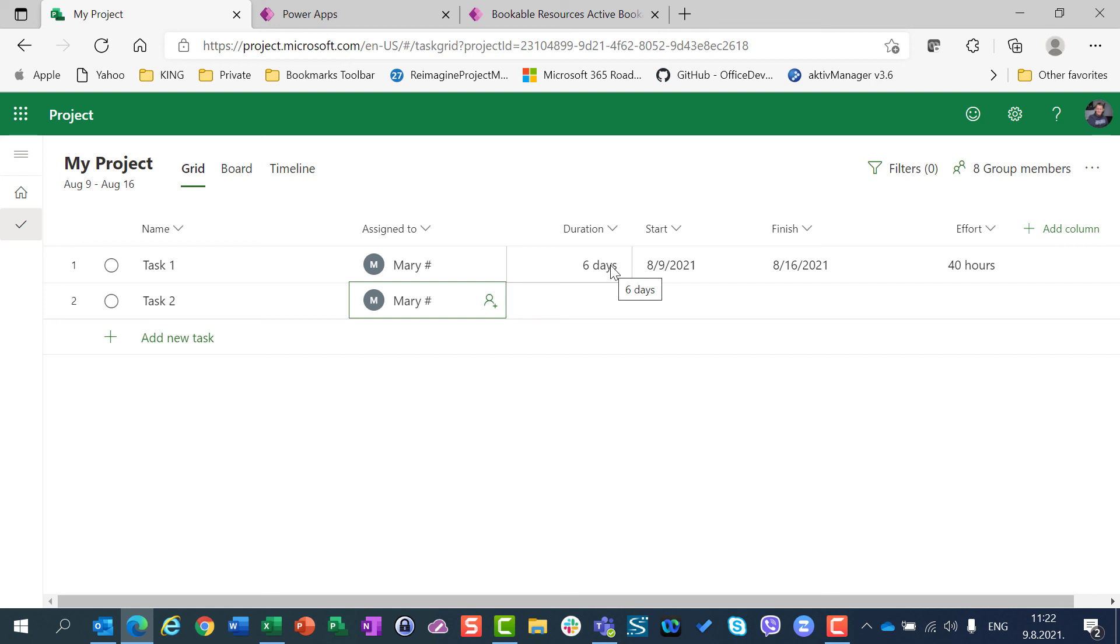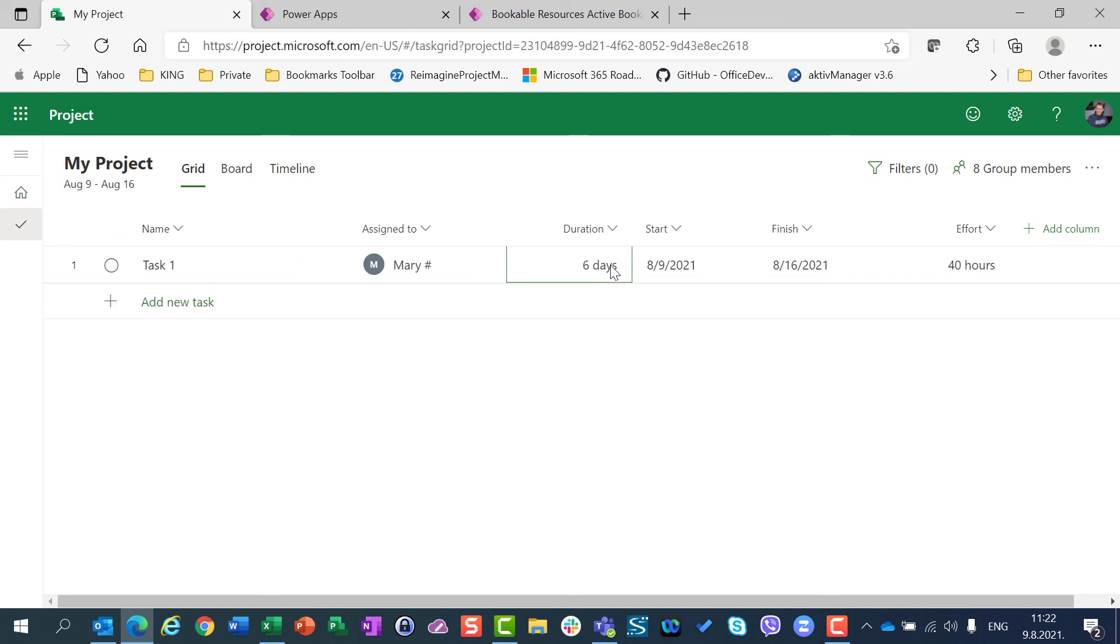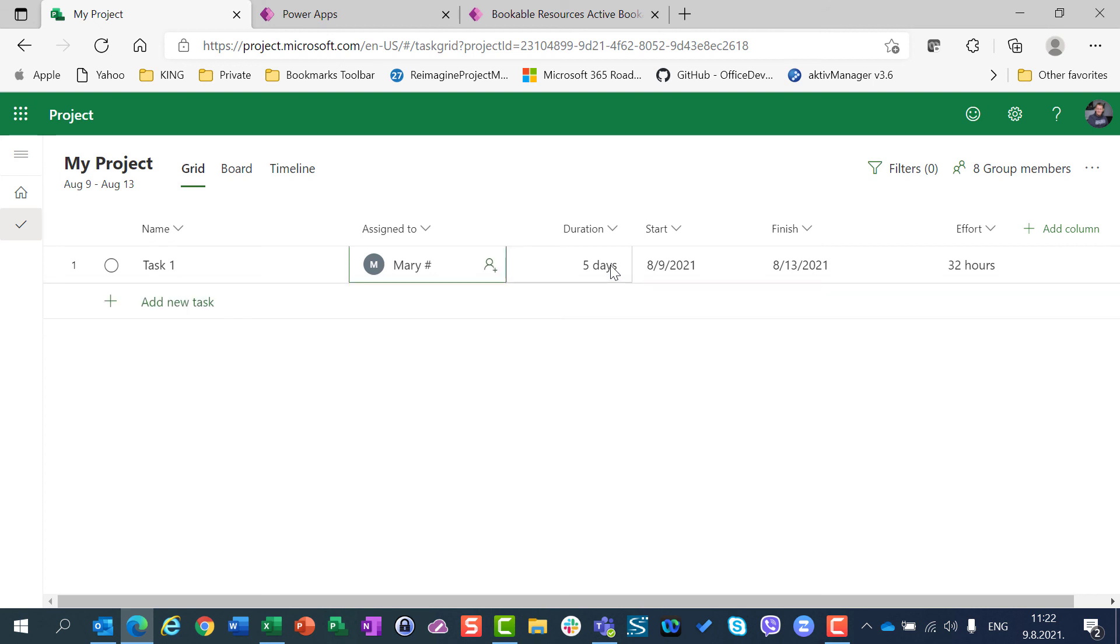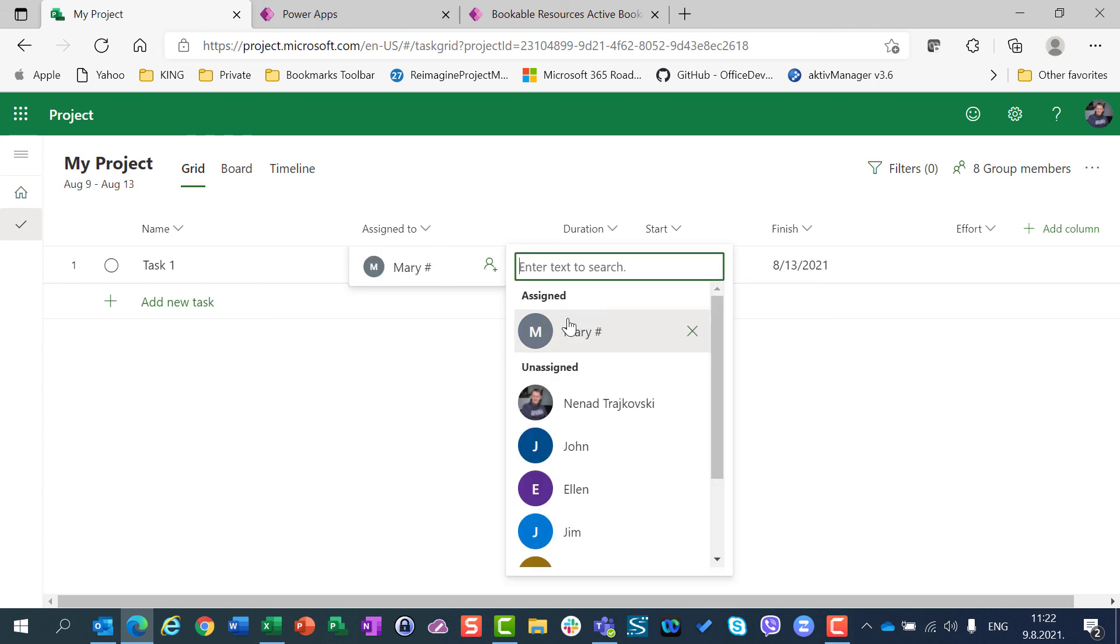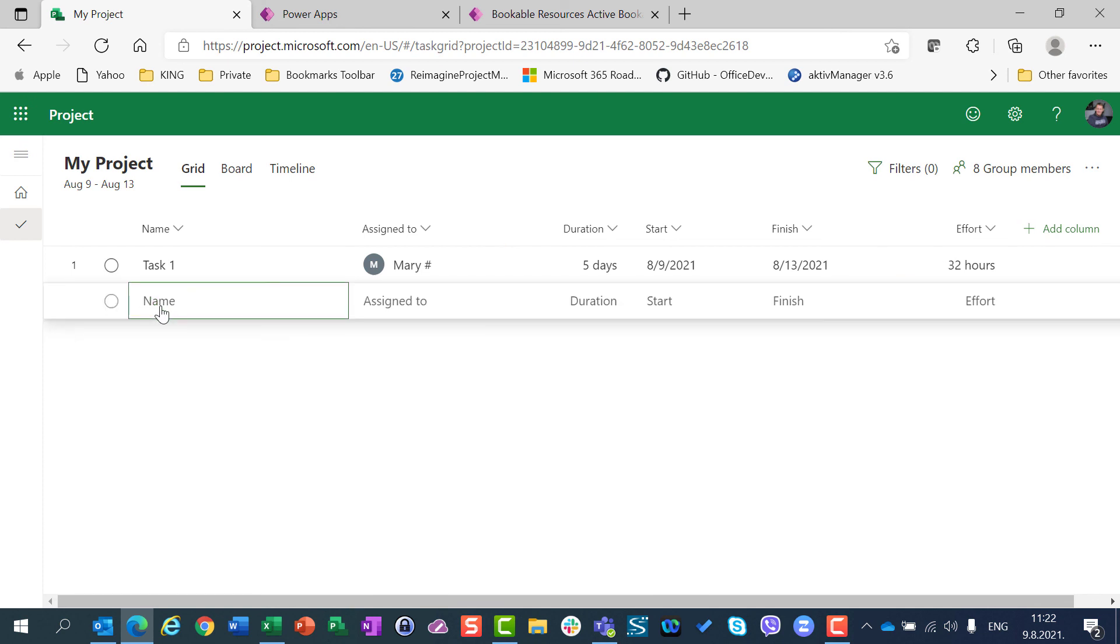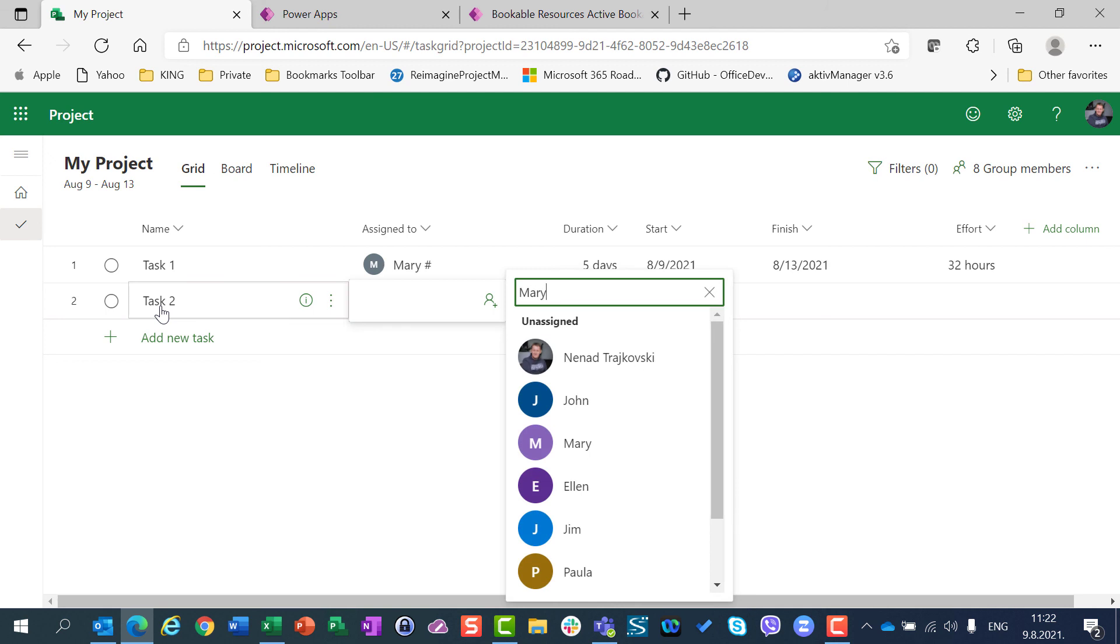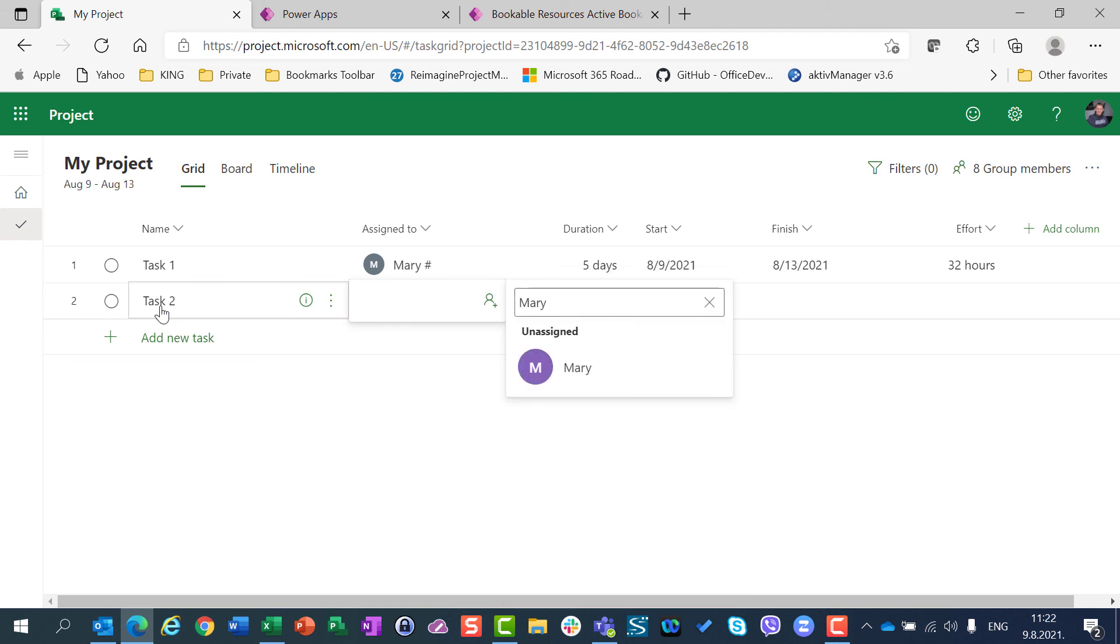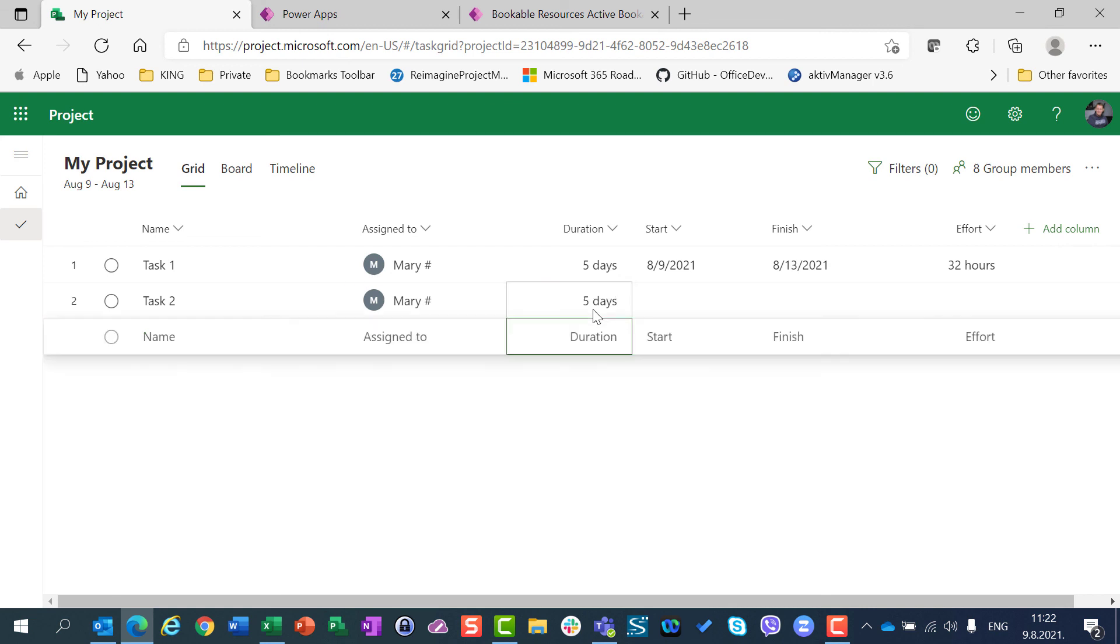So, to avoid that, you should deassign Mary and assign her once again. And you will have five days, 32 hours. Now, task 2, Mary. And you will see that if I put here five days, everything will look fine.